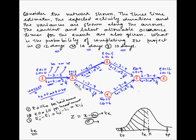For activity 2-4: condition 1 — EO = 2, LO = 2 for the tail event, so met. But condition 2 — EO = 5 and LO = 6 for the head event — this is not met. So activity 2-4 is not a critical activity. For activity 4-5: for the tail event, EO is not equal to LO, so condition 1 is not met. Activity 4-5 is also not a critical activity.